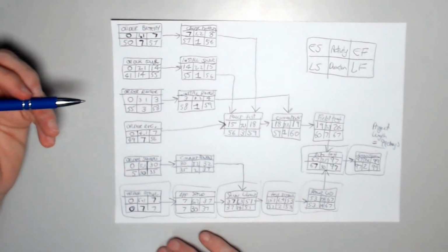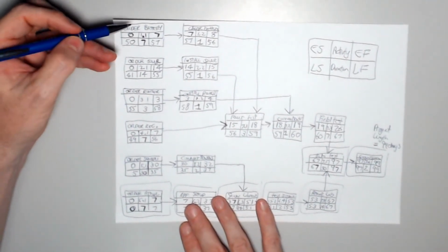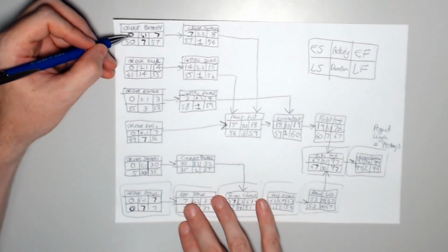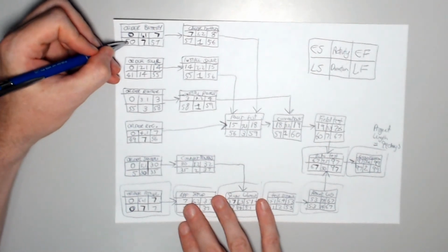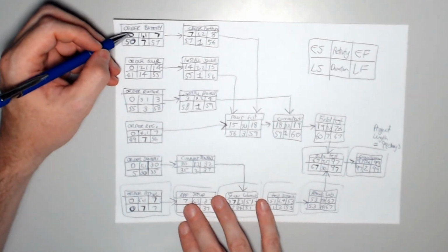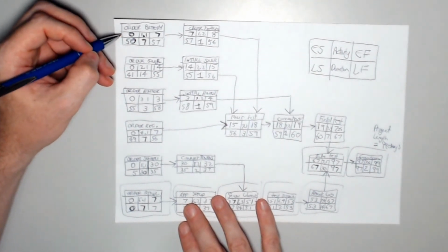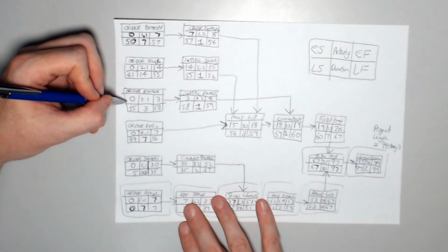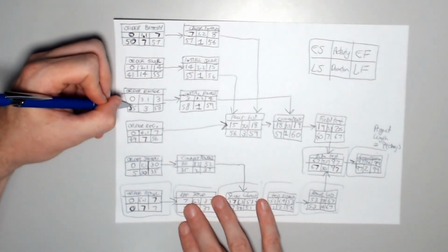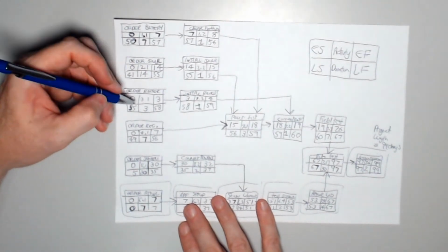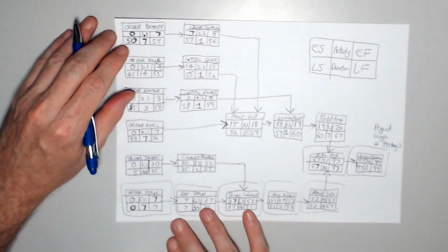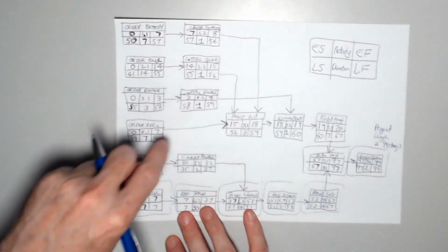And so let's have a think about this. So if we actually went up to, say, the battery, the earliest start to order the battery is day 0, but the latest start, you actually don't need to order this battery until day 50 at the very latest. So you have a slack there of 50. What about this one here, ordering the router? We don't have to order the router until day 55 at the very latest. Not that you'd want to do that, you want to order it early, but you have plenty of slack up your sleeve, and so forth. So it does give you an indication of where the slack is here. So the slack in here, here, and here, this is the critical path.